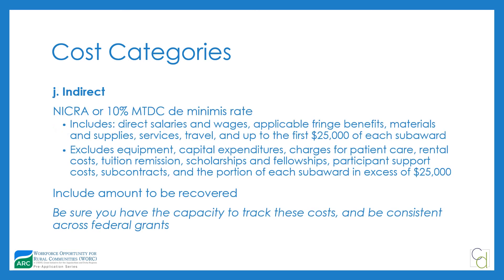The last cost category is indirect. You can use a negotiated indirect cost rate agreement — NICRA — if you have one. If you don't, you can use the de minimis rate of 10% of modified total direct costs (MTDC). Review what MTDC includes, because not all direct costs are included. MTDC includes direct salaries and wages, applicable fringe benefits, materials and supplies, services, and travel up to the first $25,000 of each sub award. It excludes equipment, capital expenditures, patient care charges, rental costs, tuition remission, scholarships and fellowships, participant support costs, subcontracts, and the portion of each sub award exceeding $25,000. Show your indirect calculation in your budget narrative and be consistent across federal grants.